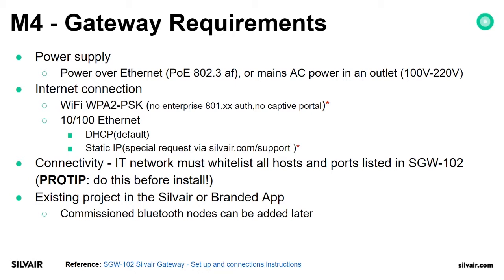These are completely independent functions for the project. Whenever you change the scheduling scenes, you would need to reconfigure the nodes. But if you just add nodes to existing zones, this won't affect the schedule.